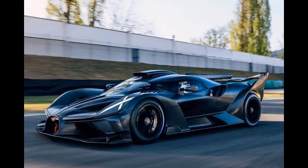Completing: LJRC evaluates the success of the procurement process based on receiving the car body on time, by July 1, as specified in the contract; the car body meeting the minimum weight requirement, achieving at least a 5% reduction from the original 2,200 pounds; the car body matching the contracted aerodynamic design features; and the wind tunnel test results meeting expectations for performance improvement on high-speed circuits, although specific lap time improvements might be harder to predict with a pre-built body.